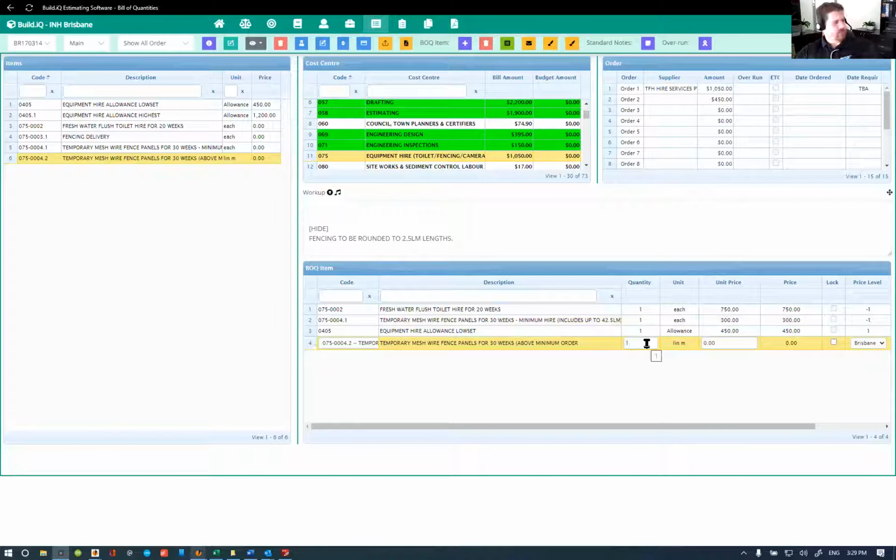Now this one had a bit more complexity in the roof line, as in there was a lot more valleys and hips, and it was a lot smaller, so you'd expect the square meter rate would get less as the house gets larger. Second to that, we have another house we've just received a quote on today, and it's a little bit more challenging. It's 2,700 ceilings with a couple of gables. So it's not going to be as appropriate, but it's a lot closer in scale.